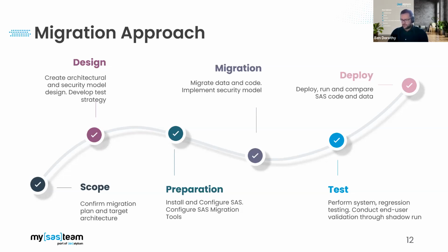So that involved a phase of regression testing and parallel run testing, and also involving the end users in that validation as well. For much of the testing, we've developed our own comparison test tools to support that phase, and make that as easy as possible, to protect the client's ongoing operational priorities as well as this project.